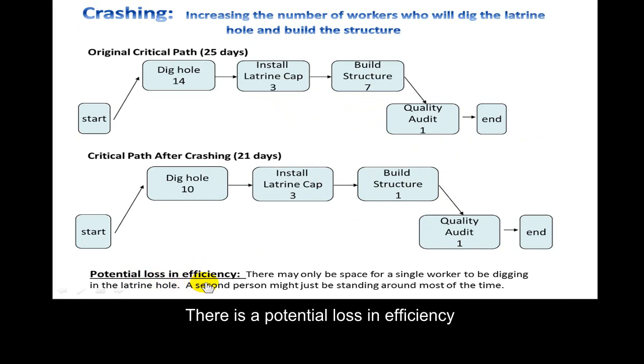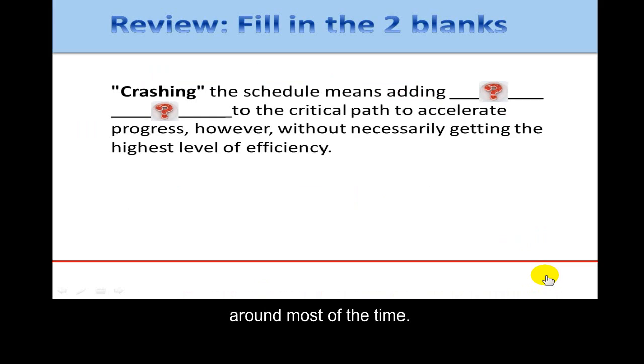There's a potential loss in efficiency when you crash. There may only be space for a single worker to be digging in a latrine hole. A second person may just be standing around most of the time. So a quick review on crashing. Fill in these blanks.